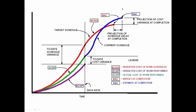When we forecast from this monitoring point, we look at how a basic estimated completion is derived. The budgeted completion is the original budget, and estimated completion is obtained from the CPI-based formula. Based on this, we can calculate the variance of total project cost at completion. Schedule variance, cost variance, SPI, and CPI are all shown in this figure.